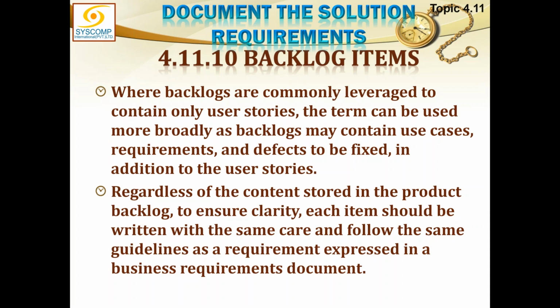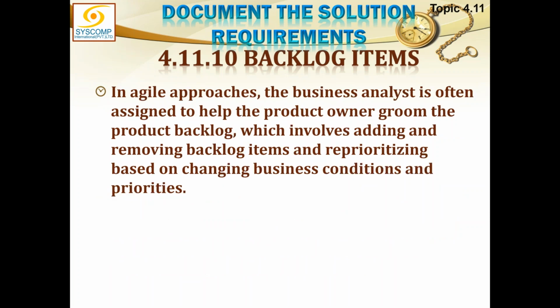Regardless of the content stored in the product backlog, to ensure clarity, each item should be written with the same care and follow the same guidelines as a requirement expressed in a business requirements document. In agile approaches, the business analyst is often assigned to help the product owner groom the product backlog, which involves adding and removing backlog items and reprioritizing based on changing business conditions and priorities.